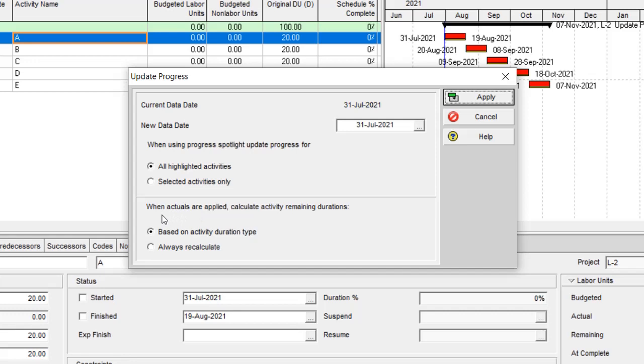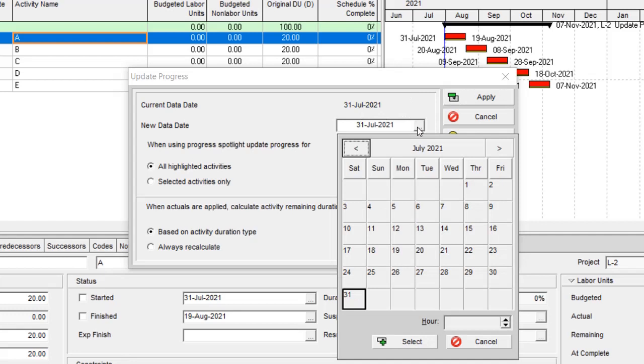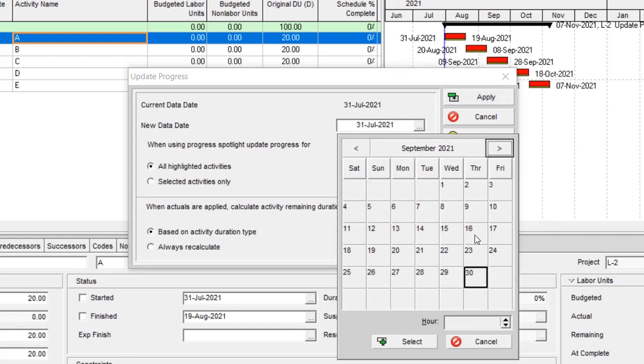But also, this option for both of them are the same: when actual or applied, calculate the activity remaining duration based on activity duration type or always recalculate. In this function, you only need to select the new data date like the previous one.